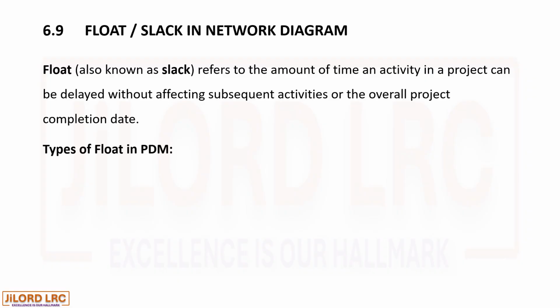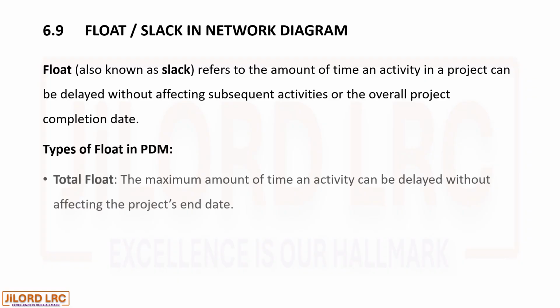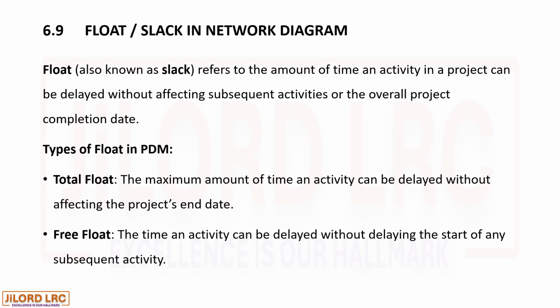Types of float in a PDM. Total float: the maximum amount of time an activity can be delayed without affecting the project's end date. Free float: the time an activity can be delayed without delaying the start of any subsequent activity. So these are two different floats.